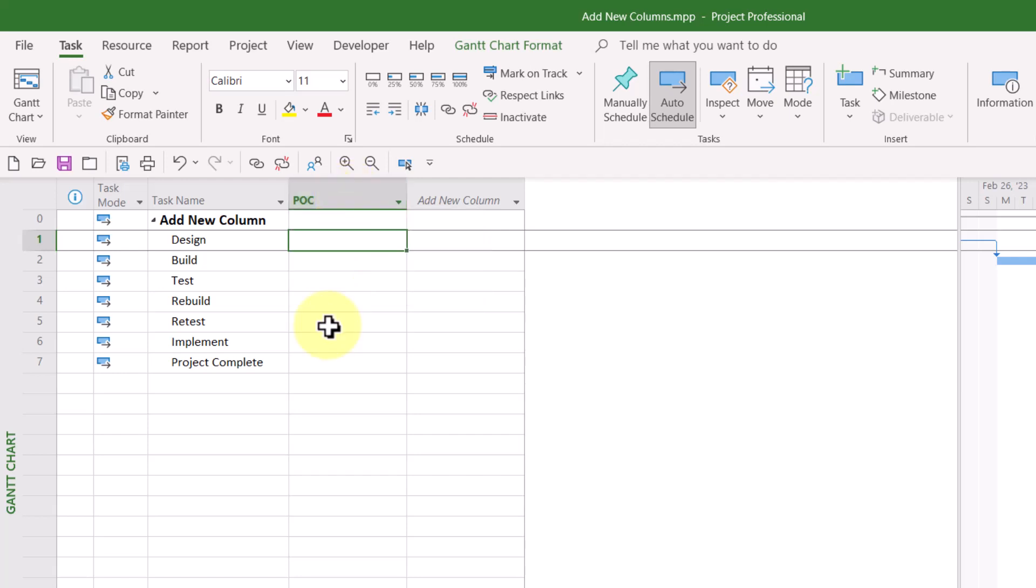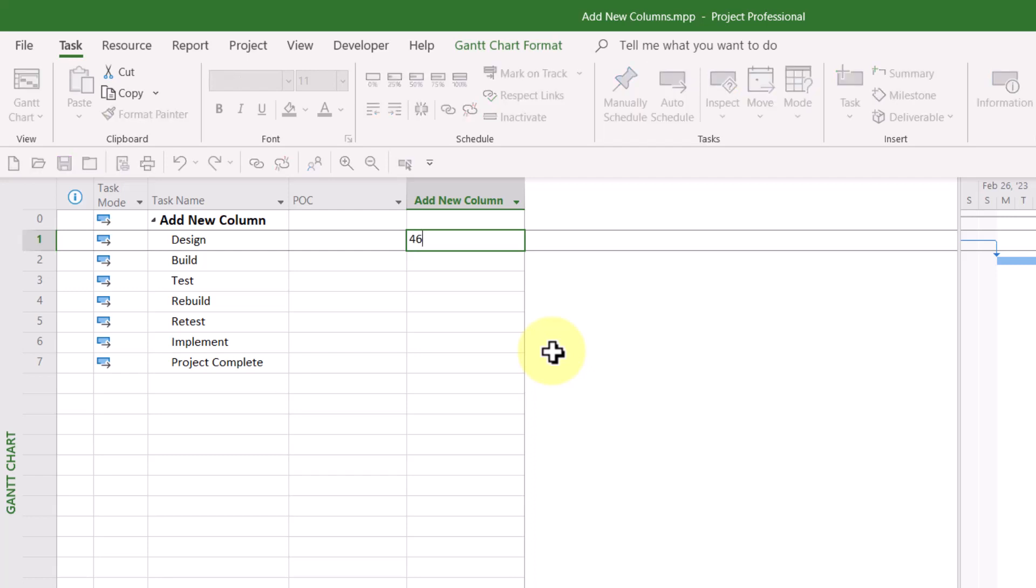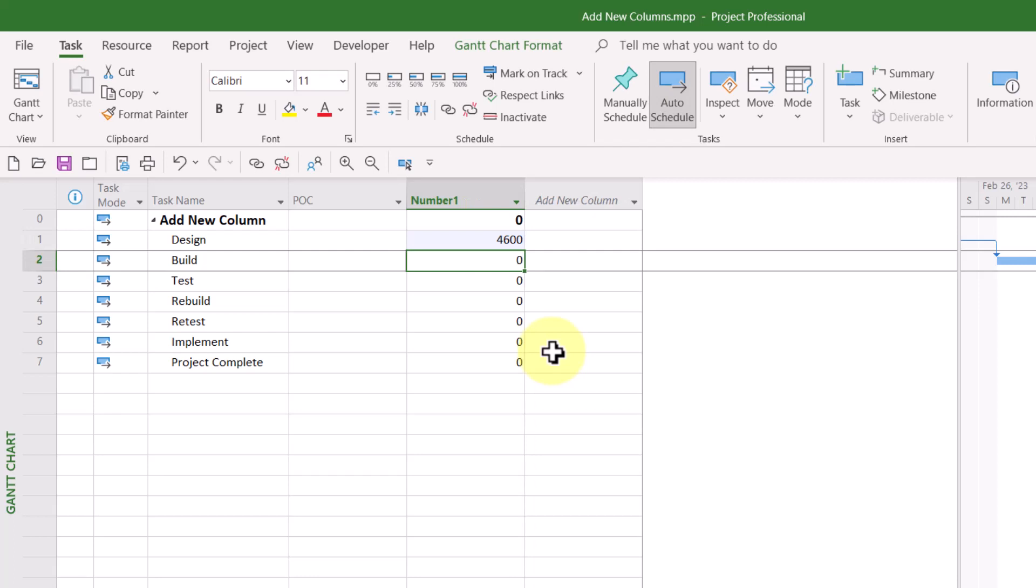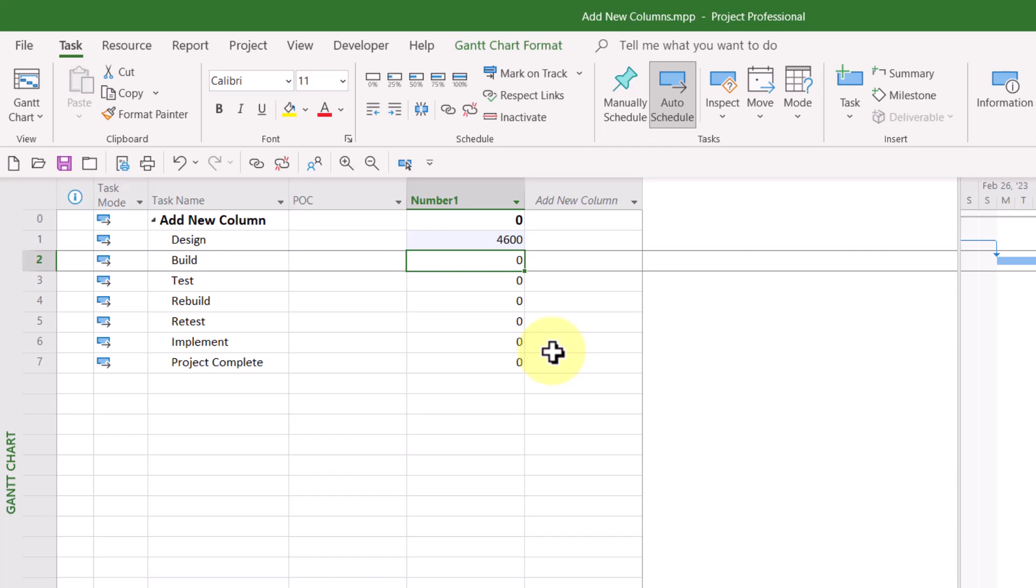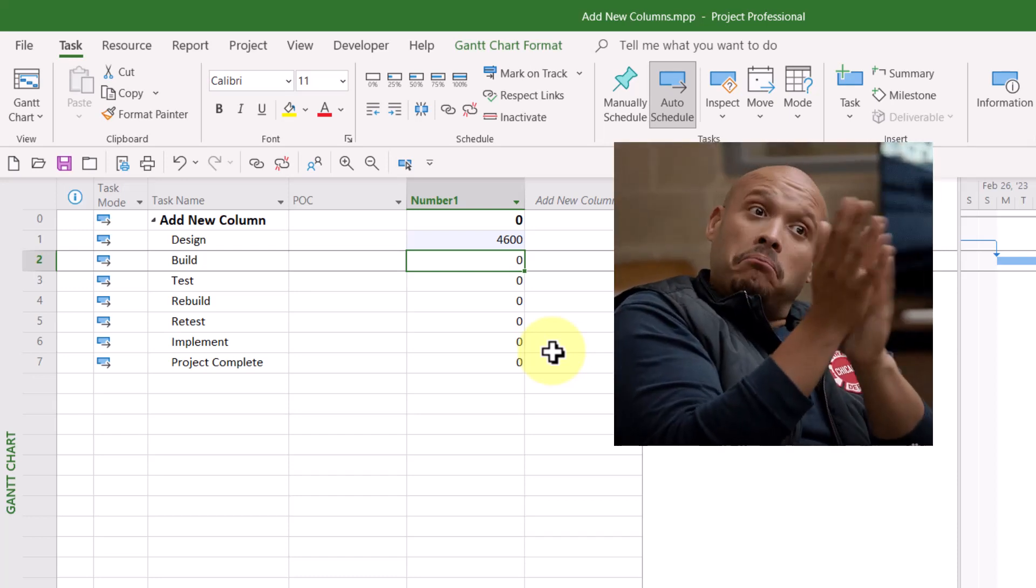But wait! There's even more interesting functionality with this Add New Column Virtual Column. If you type a data value of any type in this column for a task, Microsoft Project will behave like this. If you type a number for a task, like 4600, Microsoft Project will automatically insert the first available number field. In my case, that would be the number one column.